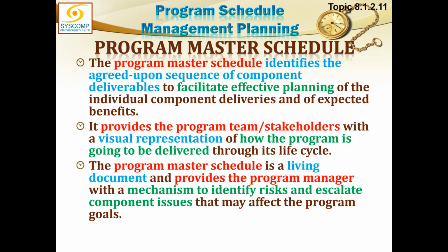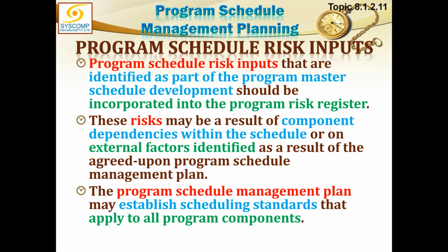The program master schedule is a living document and provides the program manager with a mechanism to identify risks and escalate component issues that may affect the program goals. Program schedule risk inputs identified as part of the program master schedule development should be incorporated into the program risk register, because the risk register, as we said, is a live document. It will keep growing as we move on.